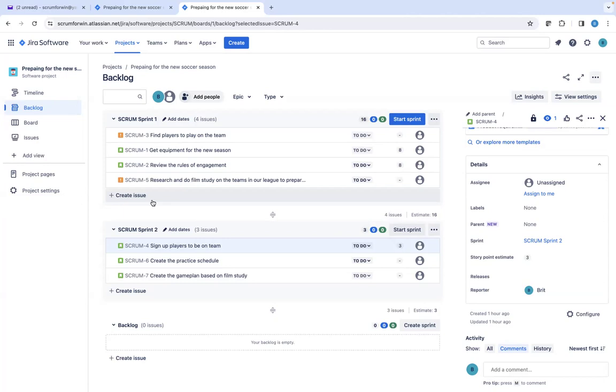And when it comes to your QA and your developers, they may have a capacity of anywhere between 8 and 13 points, aka story points. Let's just say for this example they're doing 8 per sprint. So easy math, 8 times 5. You'll say that our team typically brings in about 40 story points per sprint.